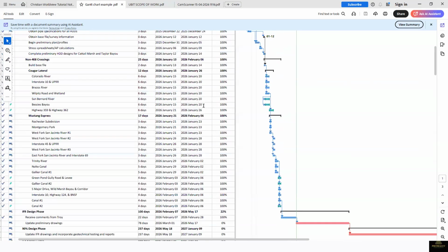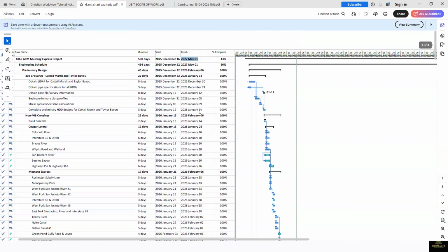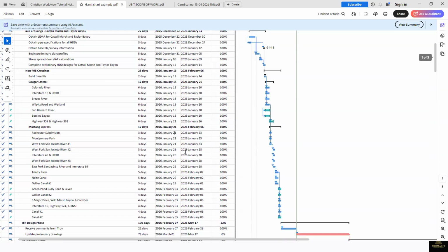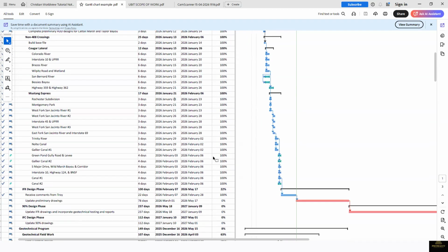Once you shift something from what you have said, it automatically affects the whole end of the project. It will move a lot of things around depending on how you have sequenced. All of these linking is what we call sequencing. You have linked them up, so when you adjust one, it affects every other thing that is connected to it, and automatically, if it's on a critical path, it's going to affect this date. So this is what you update every time.